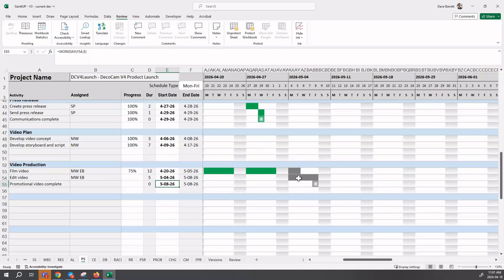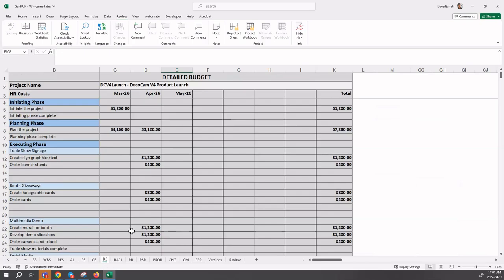Press enter and you can see what happened - we're now going to overlap these two. This introduces some risk to our project. It's a little more complicated. We're going to be editing parts of the video while we're still filming other parts. That's going to be risky, but the discussion is that in terms of trade-offs, it's felt that this is a reasonable solution.